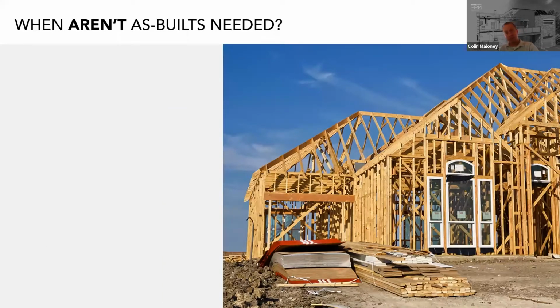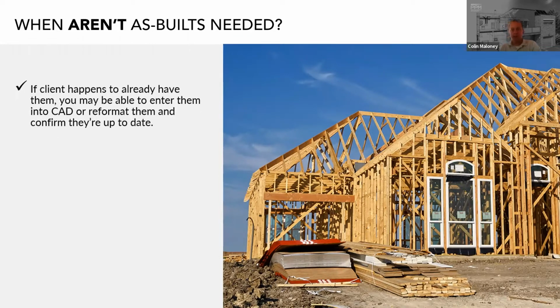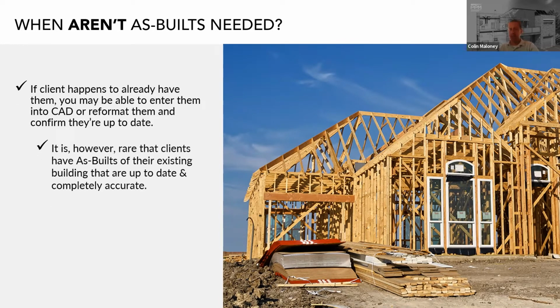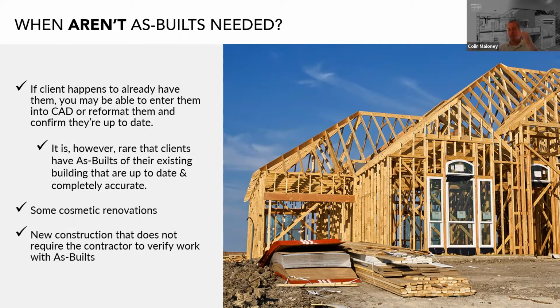When aren't as-builts needed? What are the contributing factors? It's rare that clients already have current as-builts of their existing building that are accurate, but it does happen. So in that case, you would not need more before starting your project. There's also simple cosmetic projects that don't require having accurate as-built plans. And of course, if a building's being built from scratch from the ground up, then all you're going to need is the construction documents that you create.